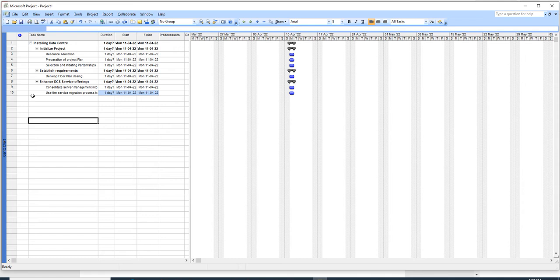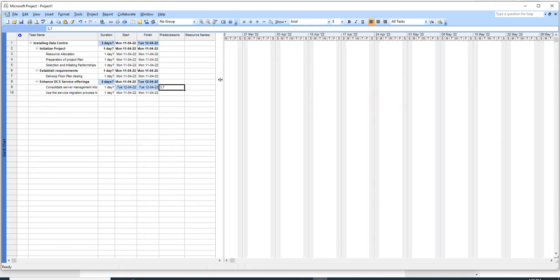After completing this, you need to identify what is your predecessor. Okay, predecessor is something like a task that should be completed before your selected task should be started. For example, if I want to start this task, this ninth task, if it is necessary to finish 3 and 7, what I do is I will give their numbers here. 3 and 7 should be finished before I start with this task. Here it clearly shows that to start this task, this task should be completed. Understood? So this predecessor task clearly explains which tasks are to be completed before starting the respective selected task.